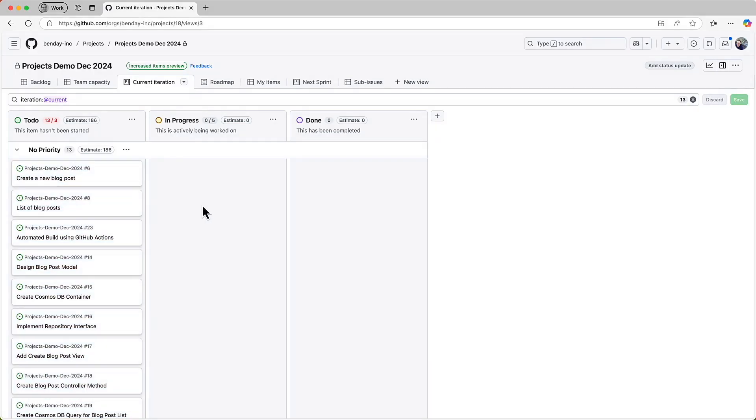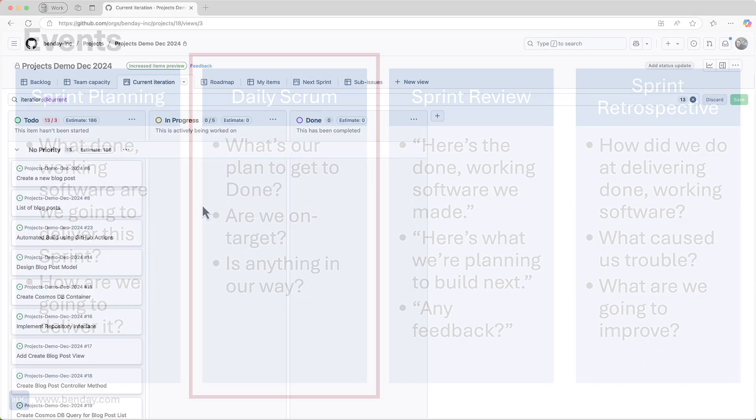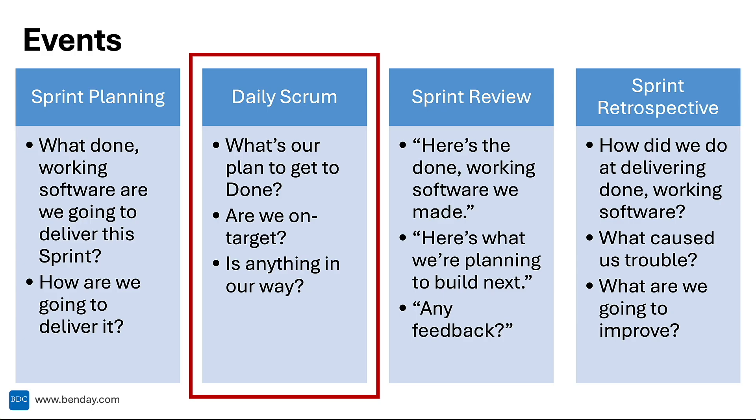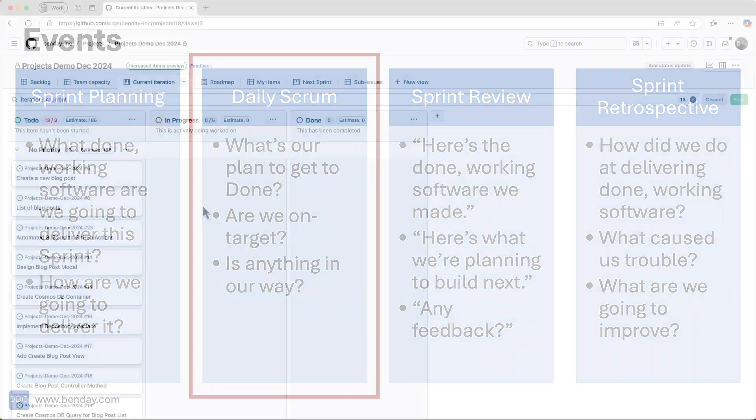Okay, so if we're in the daily scrum meeting, what are we trying to achieve? The intent is for the team to inspect and adapt their plan for the next 24 hours. Put another way, once per day, the team is going to come together to review how they're doing so far on delivering their forecasted work, the PBIs for the sprint, and to plan out their next 24 hours. Along the way, they will also discuss any impediments or blockers to delivery. The goal is to make sure that they're focused on getting the PBIs to done.